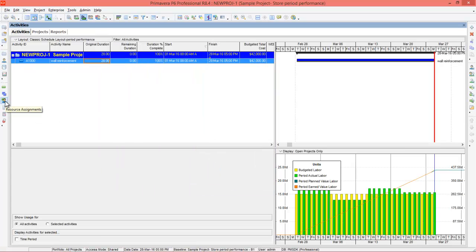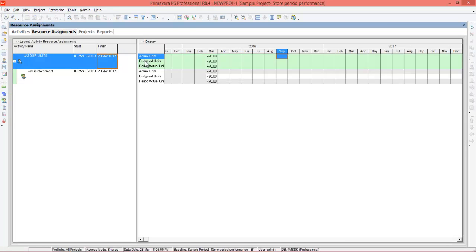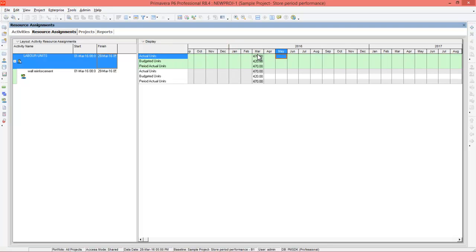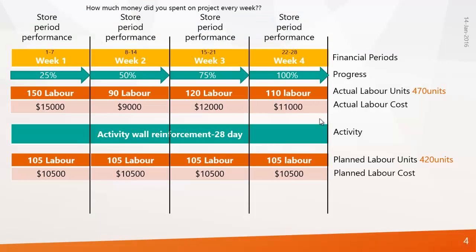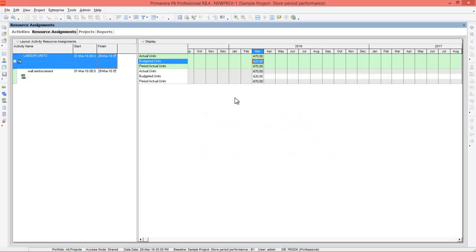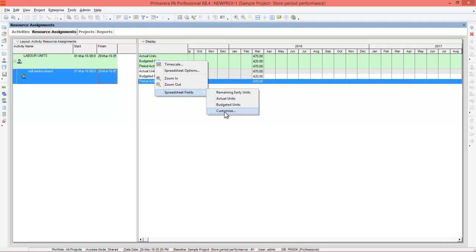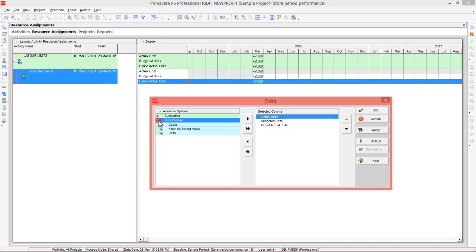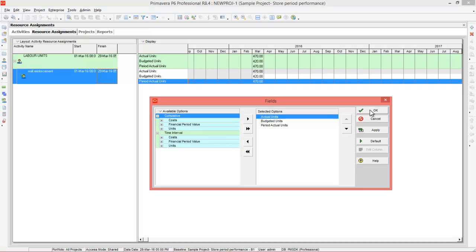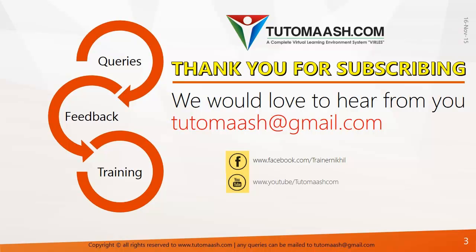You can also go to Resource Assignments, add actual units, budgeted units, and period actual units, then set the timescale to monthly. In March, actual units is 470 and budgeted is 420 — planned is 420 and actual is 470. Period actual units is also 470. You can right-click to go to Spreadsheet Fields and customize columns with whatever values you want. I hope you understood the session — if you have any doubts you can contact me on WhatsApp, Skype, or social media. Thank you for watching.